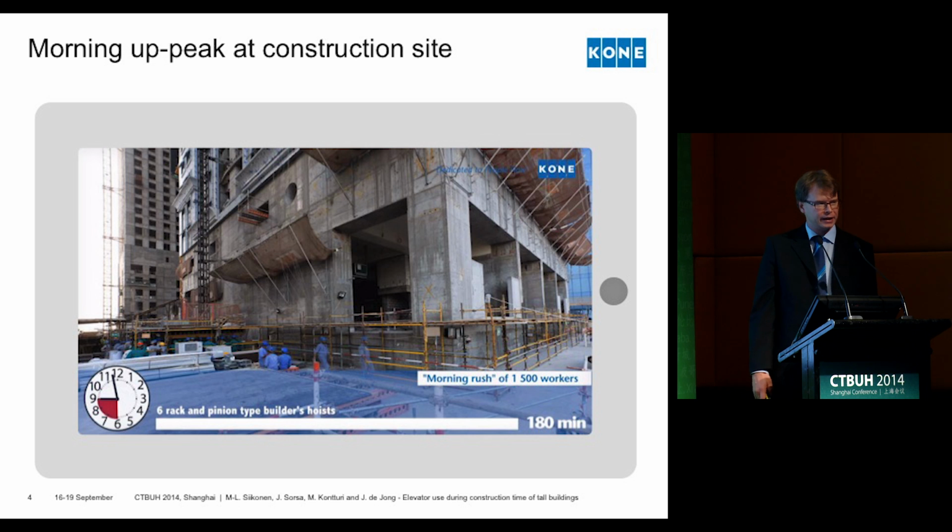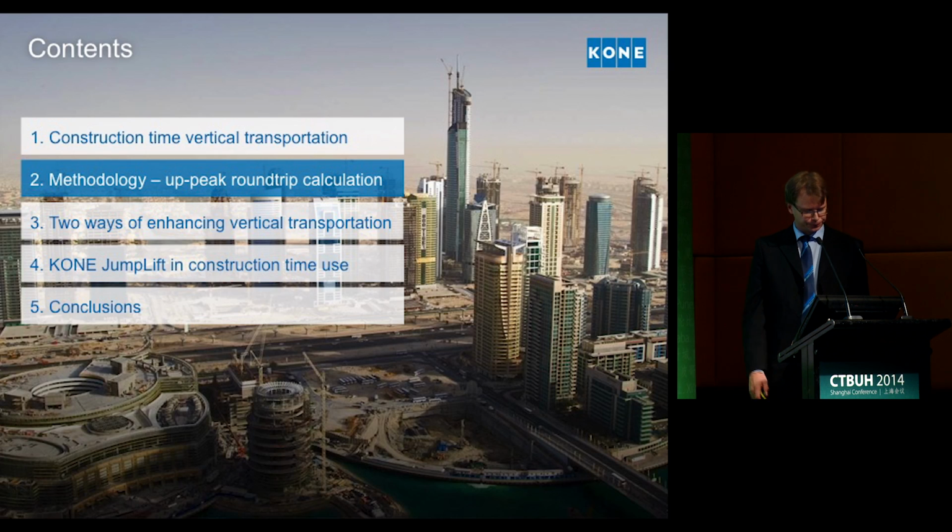So, in the end, it takes 3 hours to take all of these workers to their workplaces. So, the last ones are transported around 9 o'clock in the morning. This kind of up-peak is familiar in normal traffic design, and that up-peak is analyzed by this round-trip calculation model.